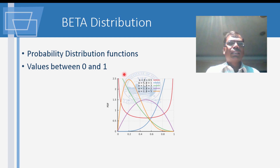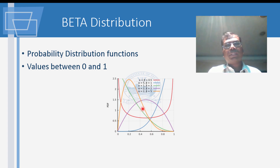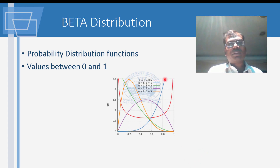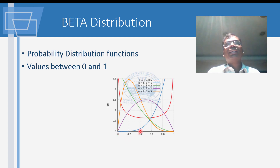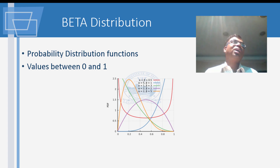If a bell curve skews heavily toward the optimistic time, pessimistic time carries very little weight and you might use different coefficients — for example, two times optimistic, three times most likely, one time pessimistic. On the other hand, if there's no chance of finishing on time, the curve shifts toward pessimistic. This is what the beta distribution question was about.